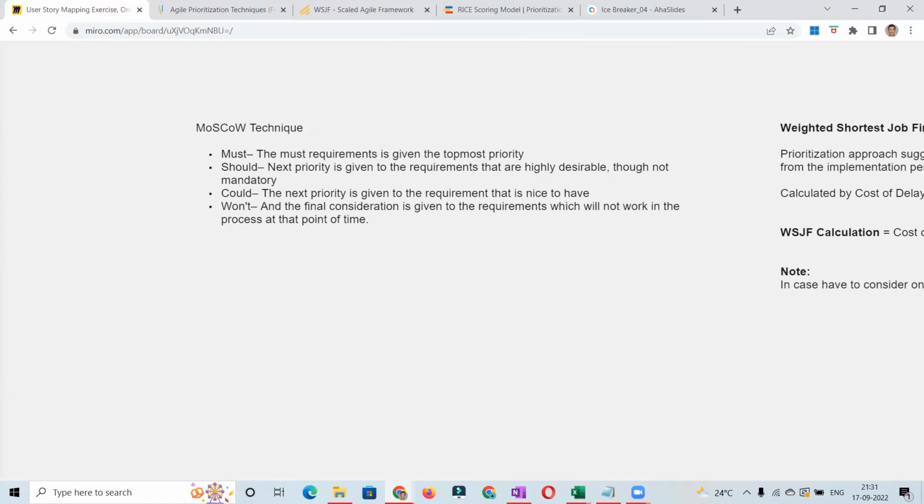And even if it's a complex piece, and you need to build it up together, still you can see whether you can pick it up at field level. So let's say you have to build up 50 fields in your request file. Then you can say I am going to do 15 in 1 sprint, and 20 in another sprint, and then at the end of the 3rd sprint you'll get the integration completed fully. So there is always a way to break down things. You just need to figure it out.